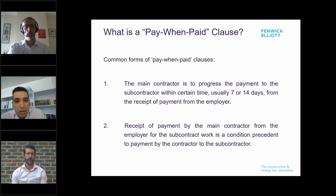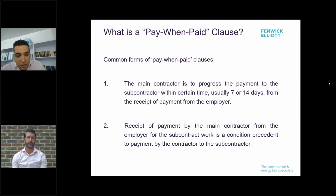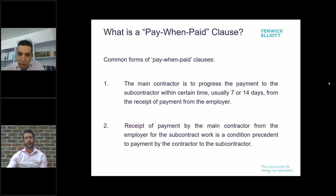Thank you very much Jeremy. Good afternoon everyone. We will discuss today the back-to-back payment provisions that are commonly used in the Middle East. These provisions are usually imposed by main contractors in subcontract agreements with the aim to pass on the risk of non-payment to subcontractors down the contractual chain, giving main contractors a tool to control cash flow. You can see on the slide the two common forms of pay-when-paid clauses.